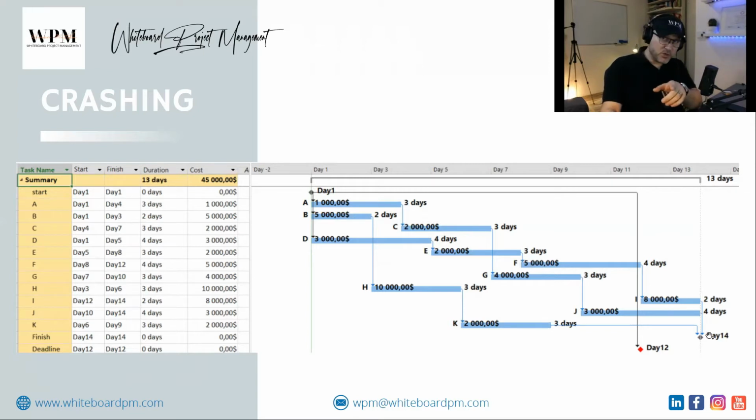So you are finishing your project in 14 days, but because of a change request, or client request, or for a reason, your deadline is modified to be on day 12. Means you have to reduce day 14 to day 12. You need to reduce the full time schedule by 2 days. What shall you do?